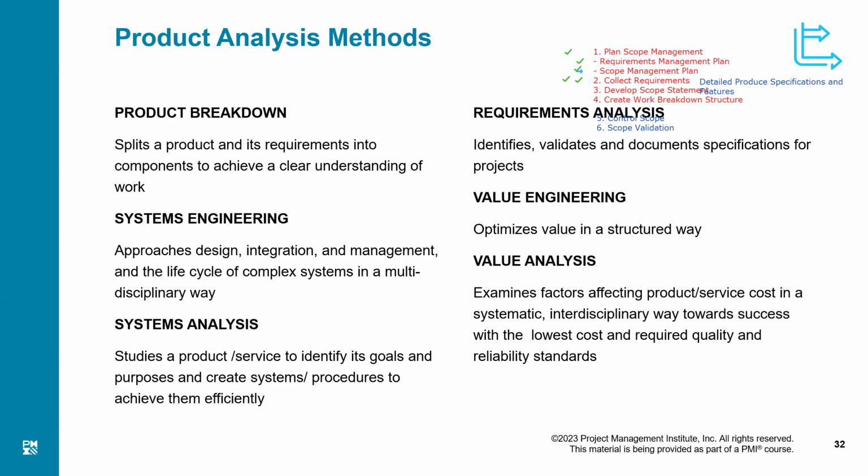But from the very beginning, PMI used to say in the definition of work breakdown structure, it could be a breakdown of the work or product or anything. But the only condition PMI puts here is, howsoever you break down a project, the lowest element must be a work. The lowest element of a breakdown must be a work. Because in a classical product breakdown, if I break down a bicycle, then the smallest units will be nuts and bolts, isn't it? Exactly.